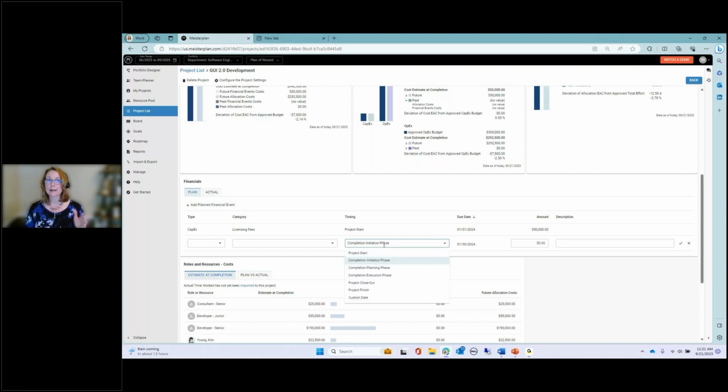The reason I say that is later, when you're figuring out when you can do that project, the financials roll with the dates based on the Gantt chart later in Portfolio Designer. So this is pretty important to keep flowing with your planning cycle. Even if you loaded all costs at your project start and all benefits at your project finish, it at least gets you closer. You can refine it to the milestones later.